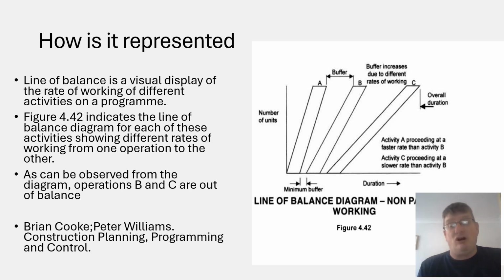If it's a repetitive job, and we link it back to lean manufacturing techniques, lean construction, that tells us there's a lot of waste going on there. Our 7 wastes, if you remember Tim Wood, Tiger Woods' brother. So there's something going on with those wastes because it's a repetitive operation. If we could produce that diagram and see where we're going wrong, we can use it as the basis of an analysis, because what we want is to have A, B, and C in parallel sequence as close as possible.